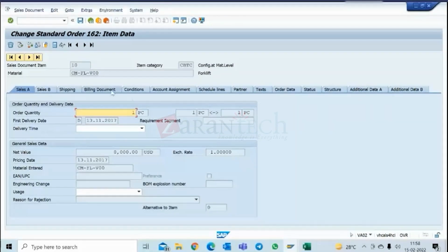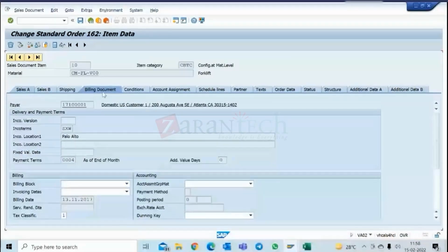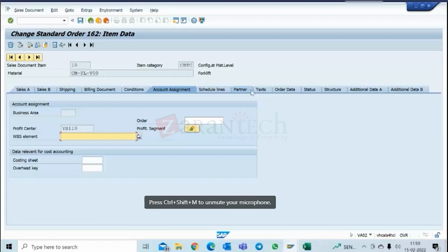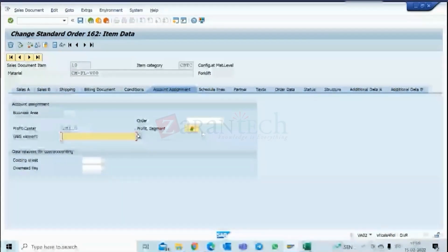Okay. Which is not coming here. So one more tab. Here we will put the account assignment, we'll put the WBS element, which is the billing WBS element. Then there will be one more tab here for billing plan. In the billing plan will be the milestones. Let's say this project has 4 milestones. Each phase completion is 1 milestone. Project kickoff is 1. Okay, blueprint ready is 2nd. Realization complete or testing complete is 3rd. Go live is 4th milestone. And each milestone has some percentage for billing. So that will come here. Okay. So that is the integration with SD we want to see for milestone.